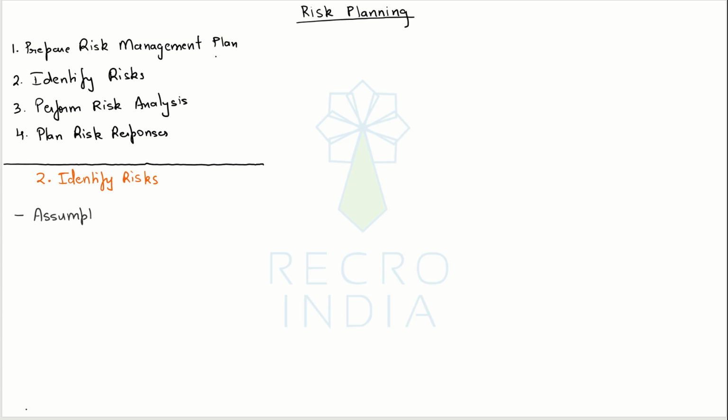like assumption analysis. See, every assumption you make during the planning, it's a risk in itself. Let's say, for example, that we will get all the resources on time. Maybe, maybe not.